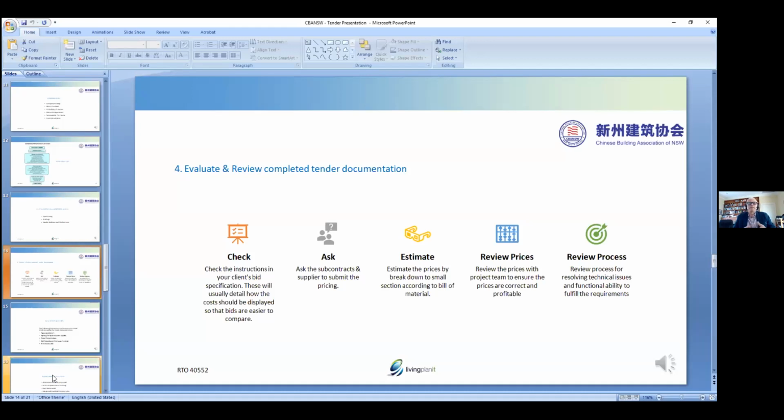Okay. Make sure you estimate correctly by making sure you cover every single area. I've been involved, when I was in commercial construction, I was a project manager, in a project where the estimator forgot to include, even though he priced it, he forgot to include it in his submission. He forgot the electrical section. We won the job. We were a very renowned company, so they didn't have any problems issuing us the job, even though we were much cheaper, because the estimate, fortunately, wasn't a big job. It was a refurbishment of a factory, an industrial building, but there was still a fair bit of electrical work.